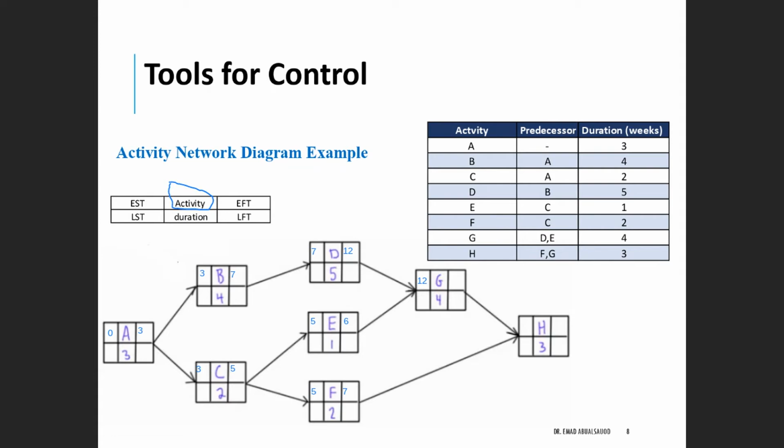That's exactly like a student who finished one of the prerequisites and didn't finish the other, and wants to register for the second course. So this is just to give a similar example of how this works. So we select the largest number. Now we add 12 plus 4, which is 16. So we will type 16 here as the early finish time for activity G.